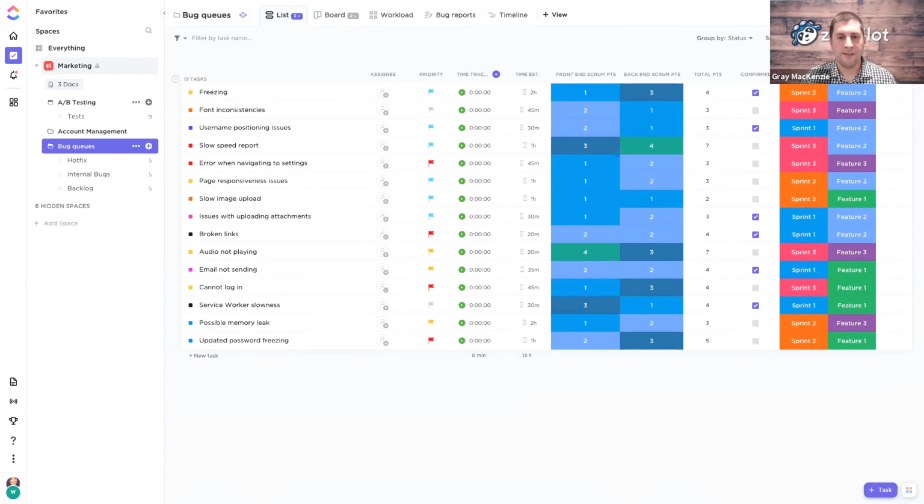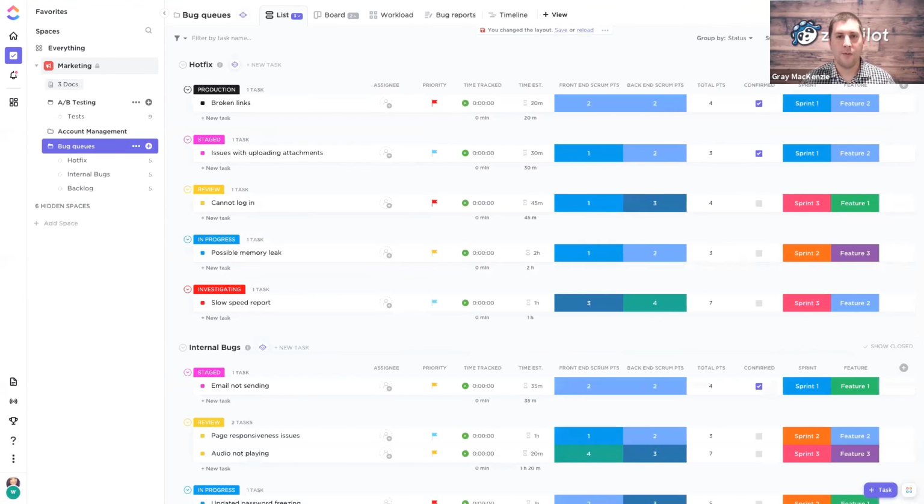We often use tags on that. So we'll just kind of go in and grab all work if it winds up on hold. And we also use the account dashboard. That's one reason that we have notifications within the account dashboard for any updates that happen. So someone changes status from being an active client to likely either delinquent or on hold or inactive, depending on how you want to set that up. That'll be a notification to the team not to continue doing work for them. So we'll use that to update and keep everyone in the loop. But then if you want to make sure that they don't do anything, you're going to want to go in and add a tag, or in some cases, I've even seen agencies archive that until the client pays again and then reinstantiate the work.